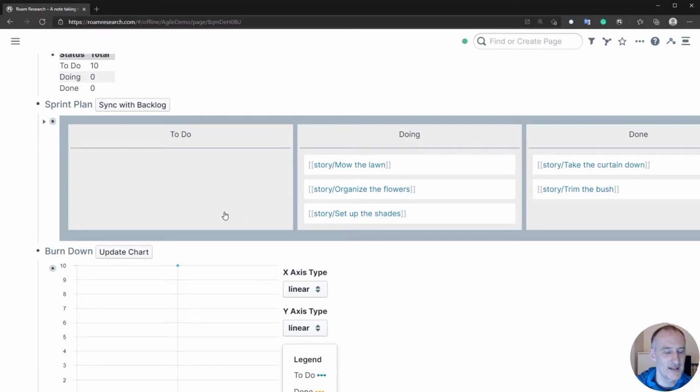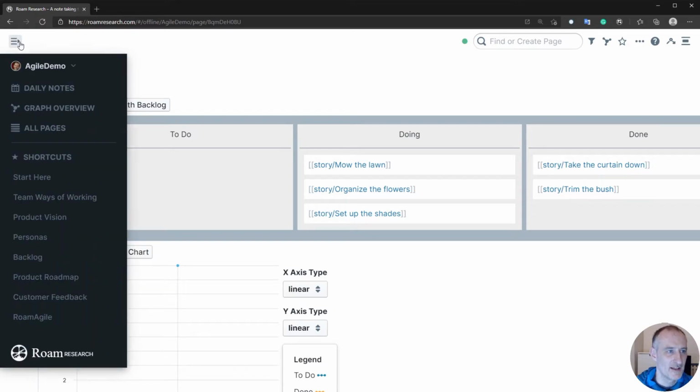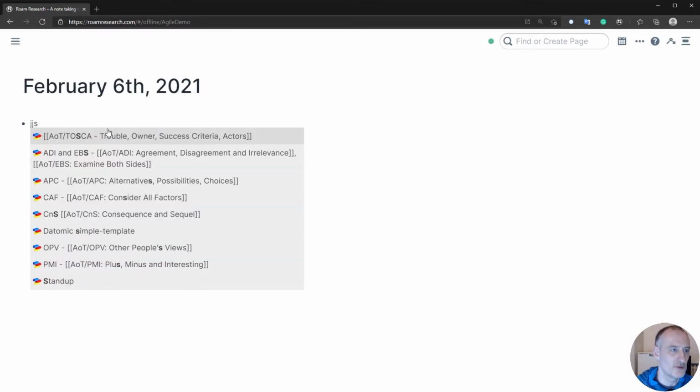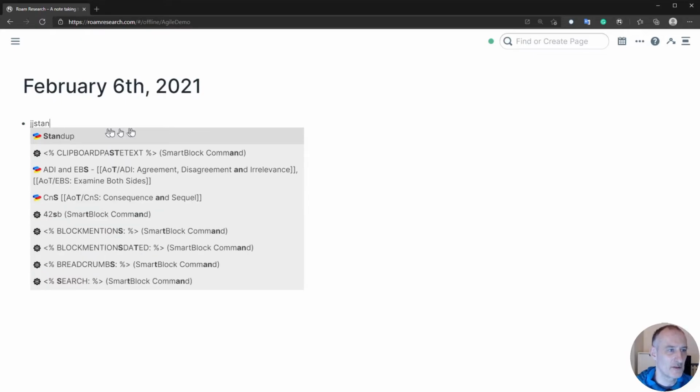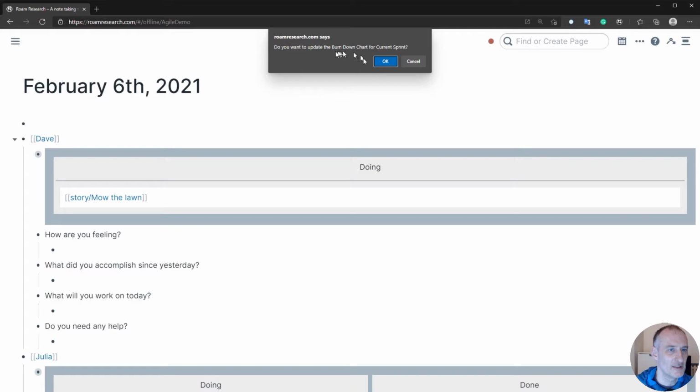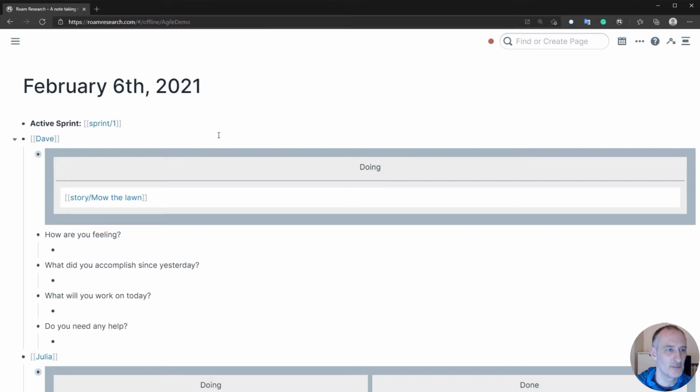And this is the time when we have our first break, and during the first break we do a quick Scrum meeting, a stand-up, which I'm going to use my stand-up script. This is of course something you would do on a daily basis. This is your daily stand-up. I run the stand-up script, and it will ask me, do I want to update the burn down chart? So I'll say yes, I'd like to track what's happening on the burn down chart.